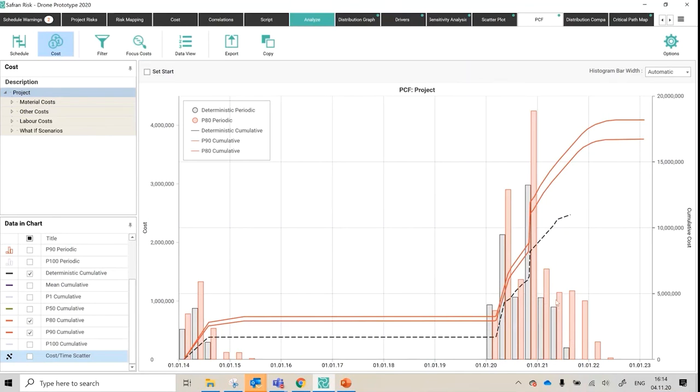But actually after the risks have been applied and the estimating uncertainties, the project continues at some rate, and the testing phase goes on because of weather and testing glitches and things. We end up hiring the airfield for longer, and you can see that cumulative cost or P80 position cost here, and then it shrinks off. So it gives you an idea of what that spend profile looks like, probabilistically speaking.